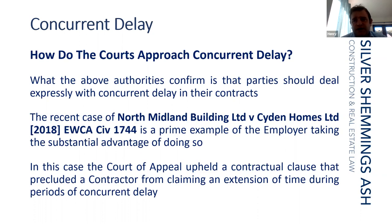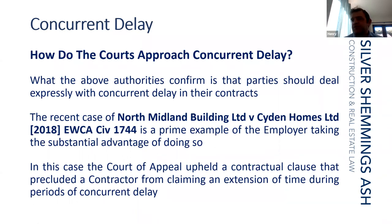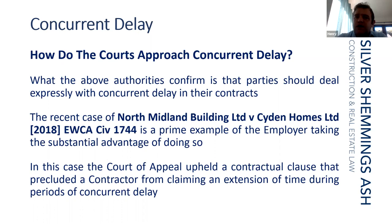The reasoning it reached the Court of Appeal was around the prevention principle. The court said the words were clear and free from ambiguity — that is what the parties had expressly agreed. When parties enter into express terms, the court will give effect to them if they are workable. It is not a matter of whether it no longer suits a party or has become a bad bargain. The purpose of the courts is not to make a bad bargain a good one — it is to give effect to what was agreed. The Court of Appeal upheld the contractual clause that precluded the contractor from claiming extension of time during periods of concurrent delay.